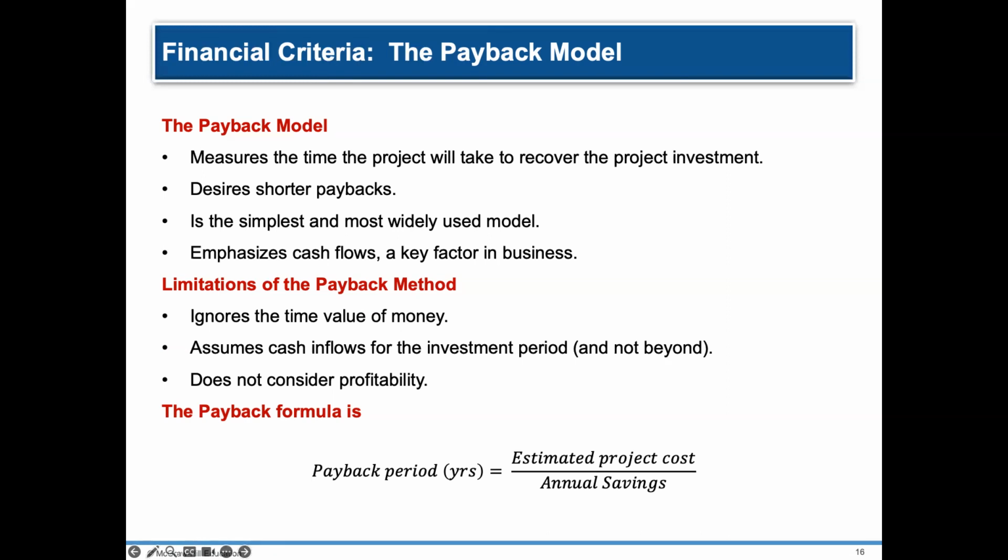And thirdly, the payback model does not consider profitability. So your only focus on the payback model is the time it takes for you to recoup the money that you spent on a particular project, and you ignore the profitability aspect of that project.